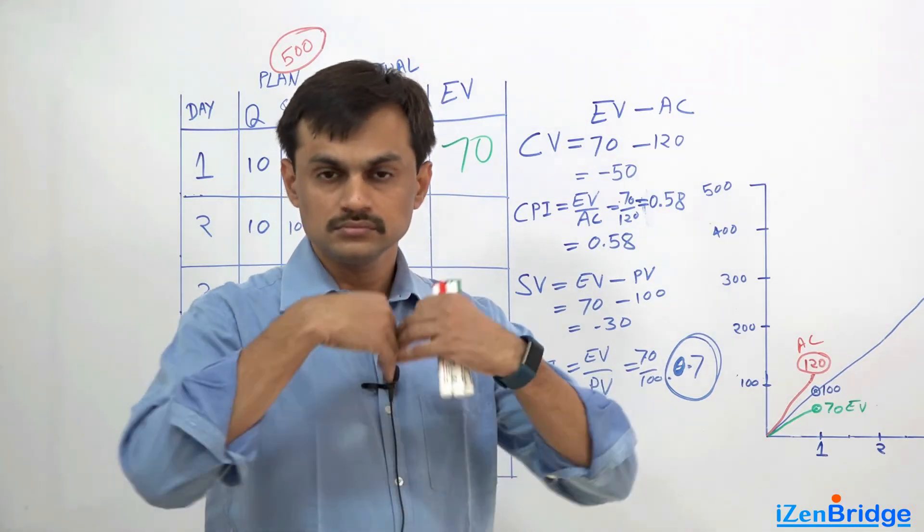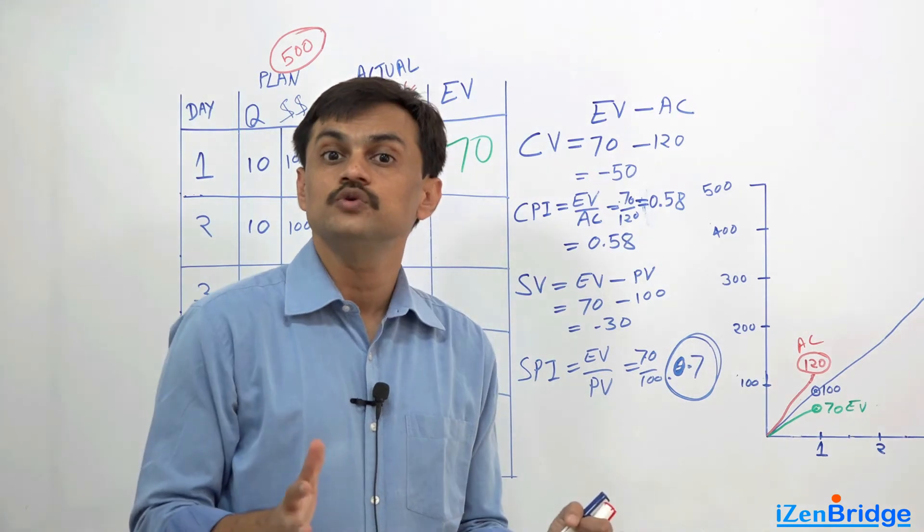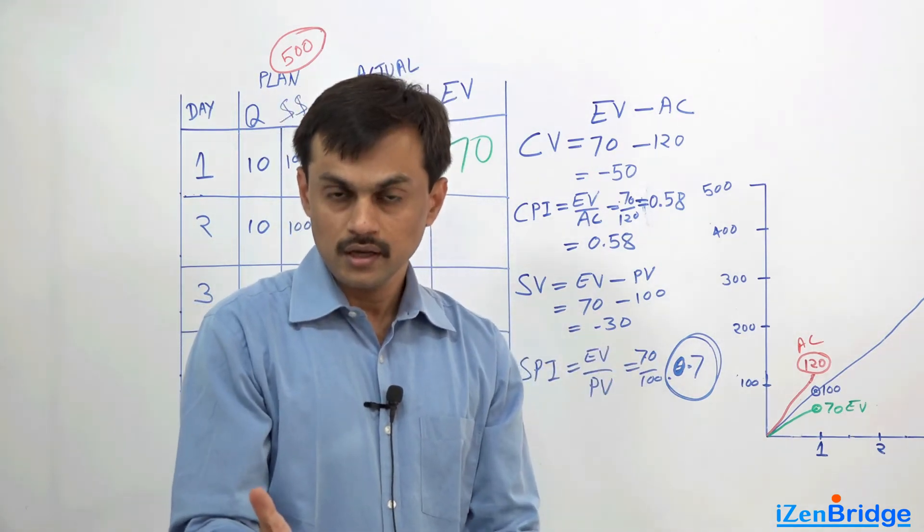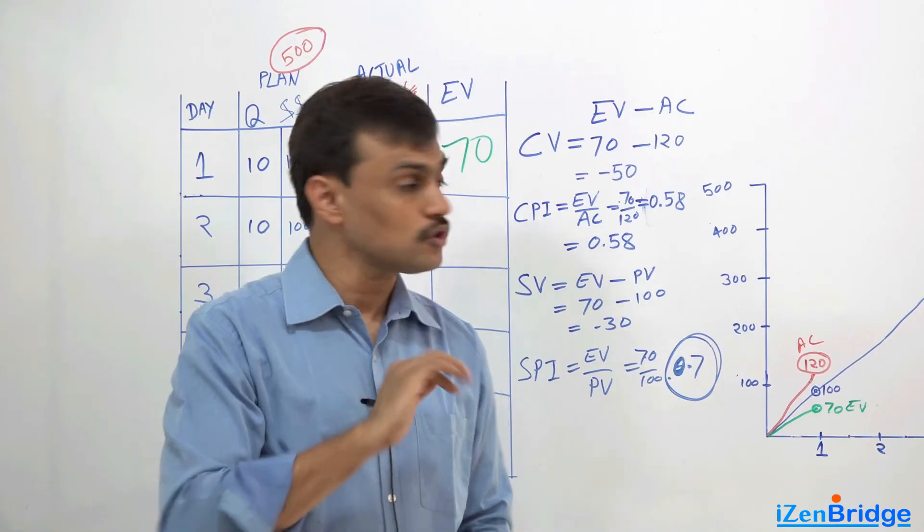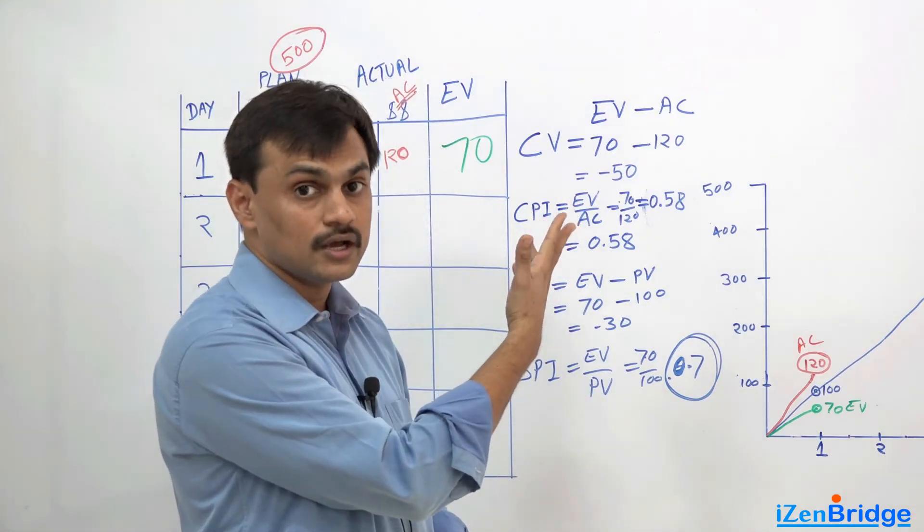Now if we do 20 machines, our earned value would have been 200 irrespective of actual cost, because cost is somewhere going in a cost performance index.